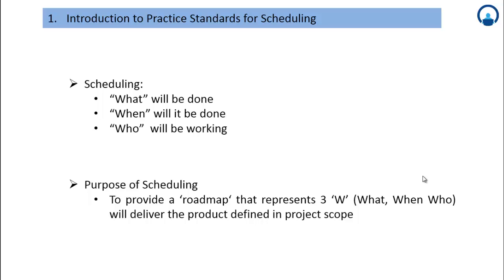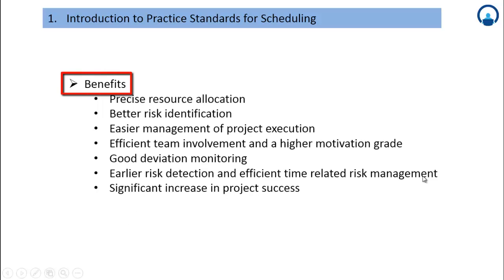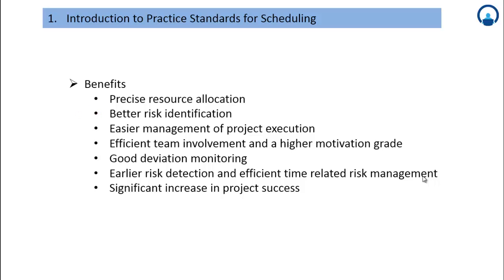Another objective is using the schedule as a tool for what-if analysis. From a benefits perspective, scheduling is a precise resource allocation method where for each activity you define exactly how many resources are needed, the skill set required, and the duration. It can also be viewed from a resource and cost perspective — if you plan to assign a resource with a given cost, you can quantify the actual overall cost of the project for that particular skill set.